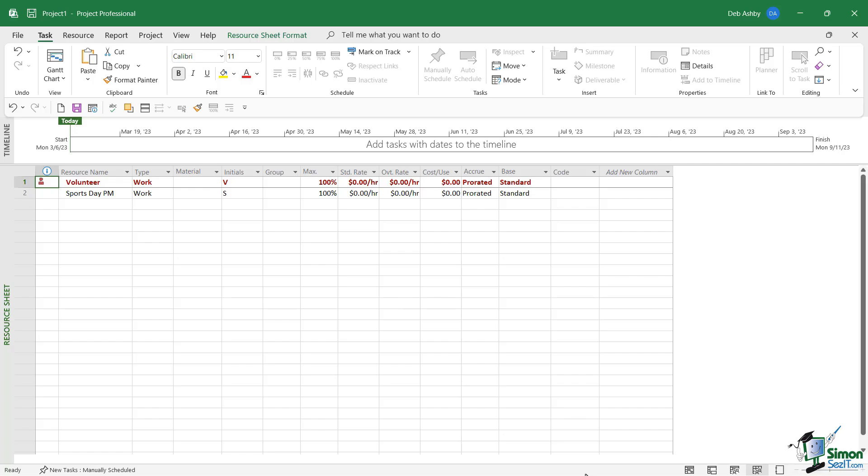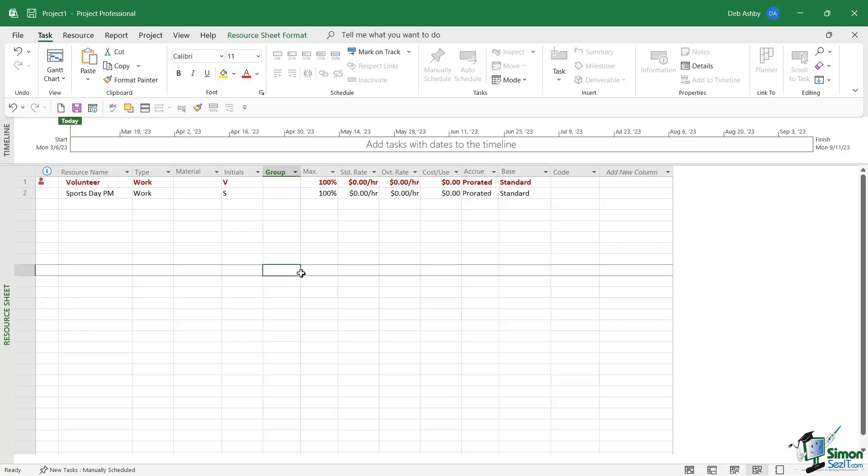the way that Project looks at these resources is that these are completely independent of the original resources in the other project plan. So these aren't the same resources; they're two brand new resources as far as Project is concerned. So in the next lesson, what we're going to look at is how we can share these resources across our project plans. Now before we leave this lesson, the final thing I'm going to do here is I'm just going